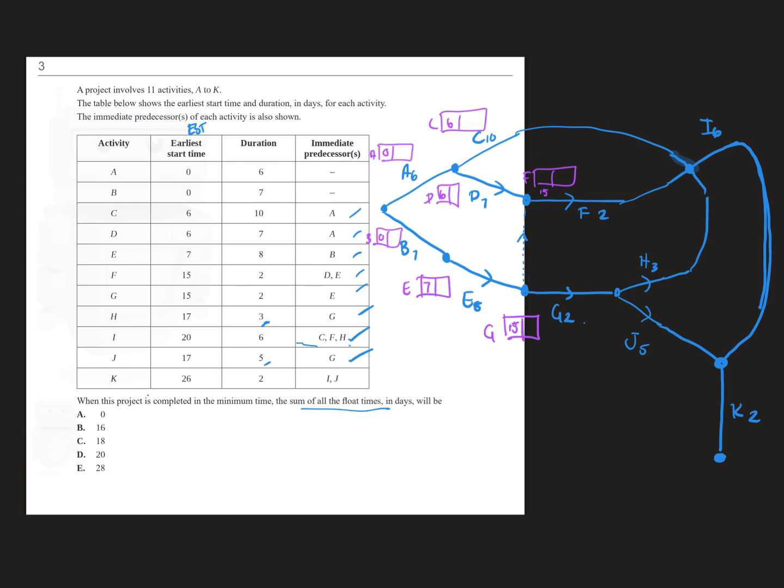And then if I look coming via D, so I'm saying coming via this way, it'd be 6 plus 7, which is 13. Now 13 is smaller than 15, so I'm putting 15 into that F, okay? And then we get over to I. Now I has 3 things coming in before it, so I better keep following along the other way.